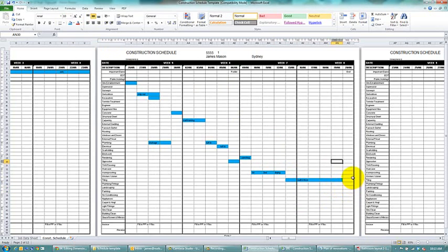After it's been tiled, we're then going to get our plumber and electrician to come back and fit off their toilets and taps and heated towel rails and things. So the same deal, we'll put the plumber in for one day and we'll put the electrician in for another day. And we'll just put in their fit off. And fit off.